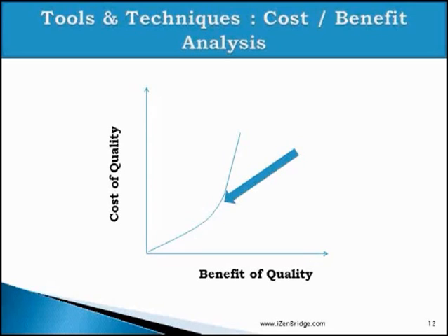Depending upon your product and your market segment, the software for air traffic control will have a different cost of non-conformance than software for a shopping cart. So depending upon your costing, you need to identify how much money you should invest in quality activities, and indirectly that results in the number of checklists you will follow, the number of quality processes or test cycles you will follow. All of that you need to document in your quality management plan, because you analyze the benefit and expenses related to quality, and now you are documenting them, and later on you will execute them.